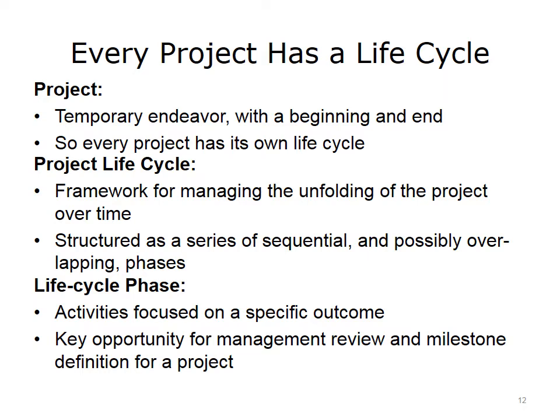This becomes the framework for you to manage the unfolding of the project. The framework can be structured as a series of phases, and these phases can be sequential and often overlapping as well. So a key element of a life cycle is a life cycle phase, and a phase is a set of activities that are focused on a specific outcome. Thinking in terms of phases provides opportunities to introduce a management review into your process, as well as to consider them as milestones to define the project and deliverables during the project.